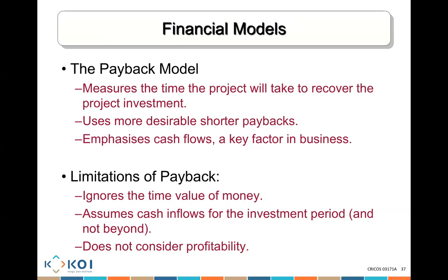Payback method. Now, payback method is like I tell you, all right, guys, I'm going to ask a question and I need you to answer me. Guys, I am going to open a project now. The project is going to cost me $1 million. I anticipate being able to earn $250,000 in cost savings per year after I implement the project. So the project will cost me $1 million, and every year I'm going to be saving $250,000. Could you guys tell me how many years I need to pay back my project?